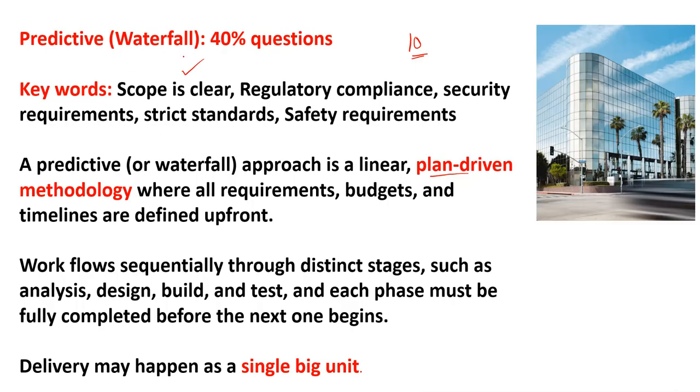That is the keyword for the predictive or waterfall approach, where all requirements, budget, and timelines are defined upfront. Work flows sequentially through distinct stages such as analysis, design, build, and test. I will explain all these words step by step in this course. But another keyword for predictive and waterfall is the single big unit. It means that when you complete this building according to your plan, you deliver this building as a single unit to your customer. This is the predictive approach.